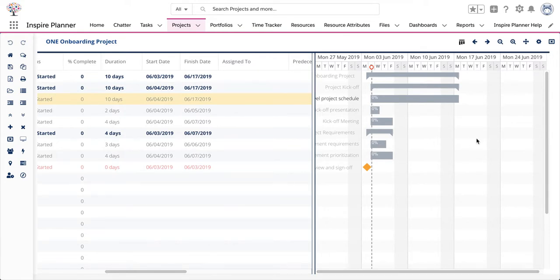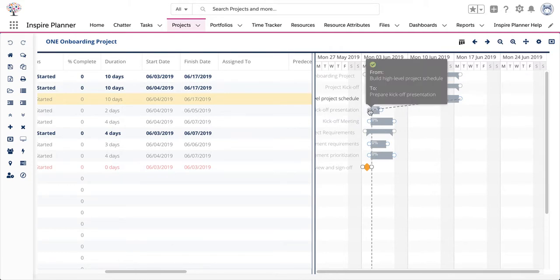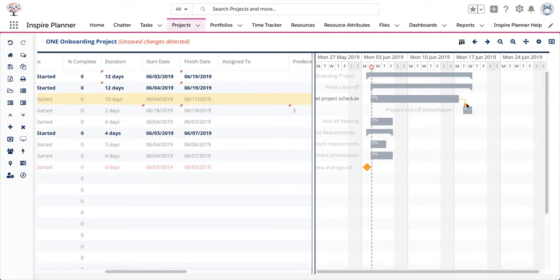the right. So to create a finish start type of predecessor relationship, simply hover over the first task and you'll find 2 circles at each end of the task, and then simply connect the end of the first task to the beginning of the next task. So this signifies a finish start type of predecessor relationship. This means that task 2 cannot start until task 1 is finished.